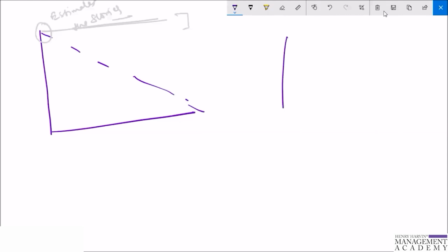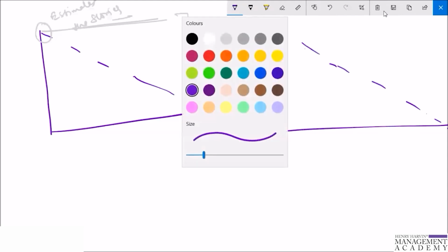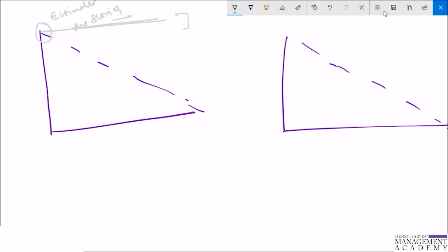So there is another graph which comes here and then goes up. The first sprint typically looks like that. And it is a good source of knowledge because the team has failed significantly and it is highly visible. Stories or tasks were added to the sprint backlog every day without any progress recorded.